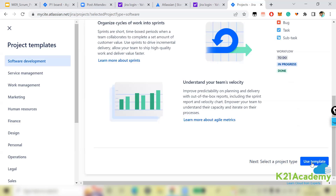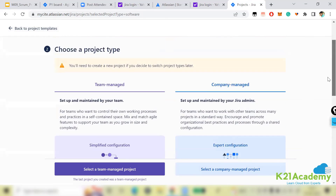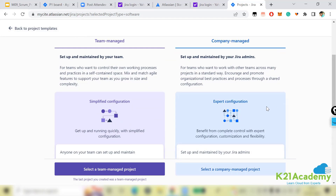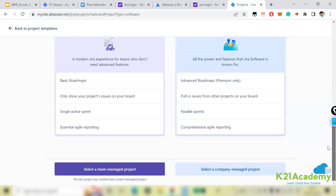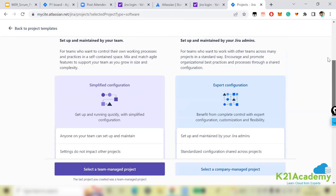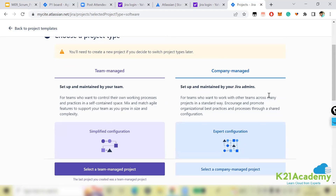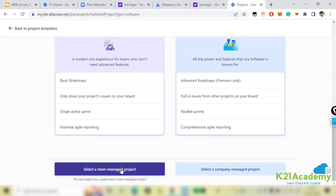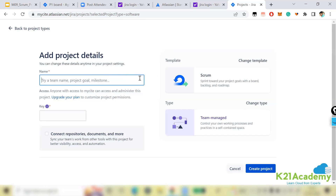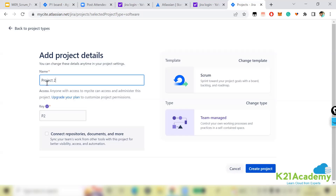Click 'Use this Template'. It will then ask whether you want a team-managed or company-managed project. Company-managed means Jira administrators take care of everything; team-managed means the team handles it. Then enter your project name — for example, 'Project 2' — and set a key, which can be anything you choose.